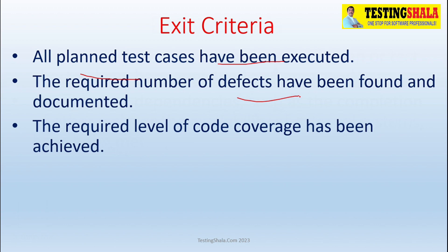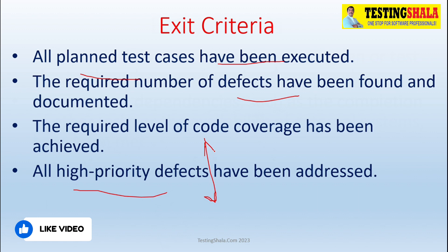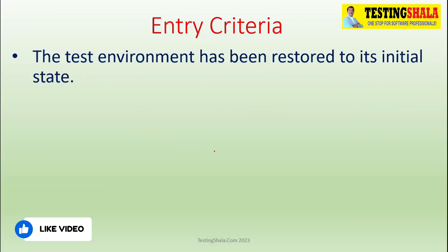The next exit criteria is code coverage — enough code coverage should be achieved, whether for unit testing or system testing. Our test cases should be good enough to cover complete code coverage. The fourth exit criteria is that all high-priority defects — severity one and severity two — are fixed and addressed, so the testing team can certify the product.